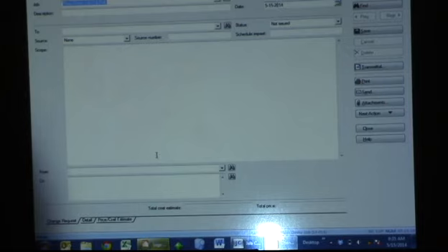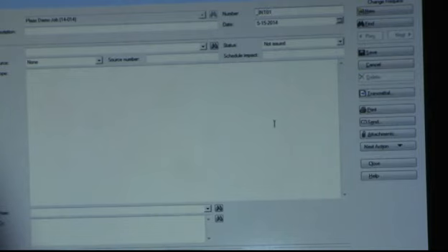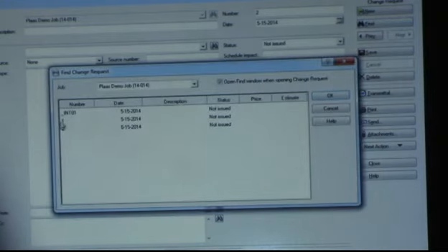So this is the change request tool, which is for building a change order proposal to send to your customer. Everything in PJ auto numbers, but if we're doing lots of internal changes, you probably want to have separate numbering. So I usually do an underscore and then INT for internal, and then 01 for my first one. The reason I do that is because when you press new, it's going to look at whatever number was in there and add one to it. So if I have change request number one, next time I press new, it'll create change request number two. Putting an underscore means that it's always alphabetically higher in the lists, so I can manually manage my numbering for my internal stuff.